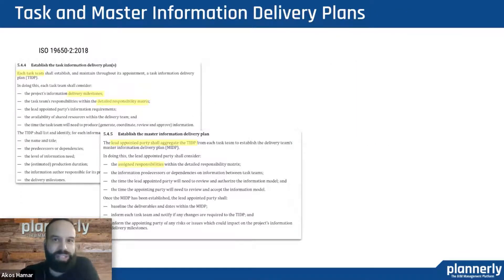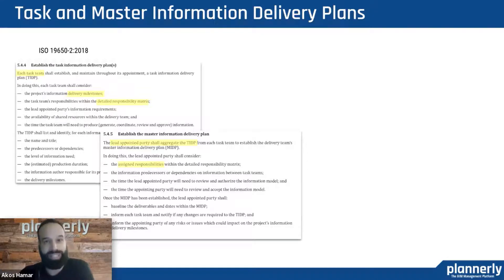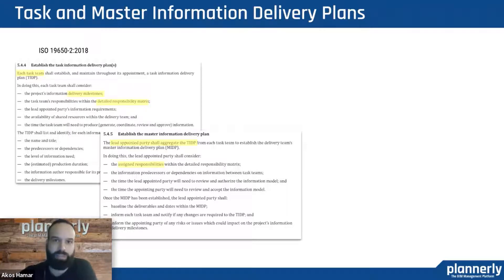TIDP and MIDP — the task and master information delivery plan. To put it simply, this is a task list. Each task team assigned a certain activity puts together their to-do list and documents how they are going to execute and carry out those tasks — that's the task information delivery plan. The lead appointed parties, the ones in charge of bringing things together, assemble what's called a master information delivery plan — a set of task information delivery plans combined. That's going to be the way of carrying out the project in the end.